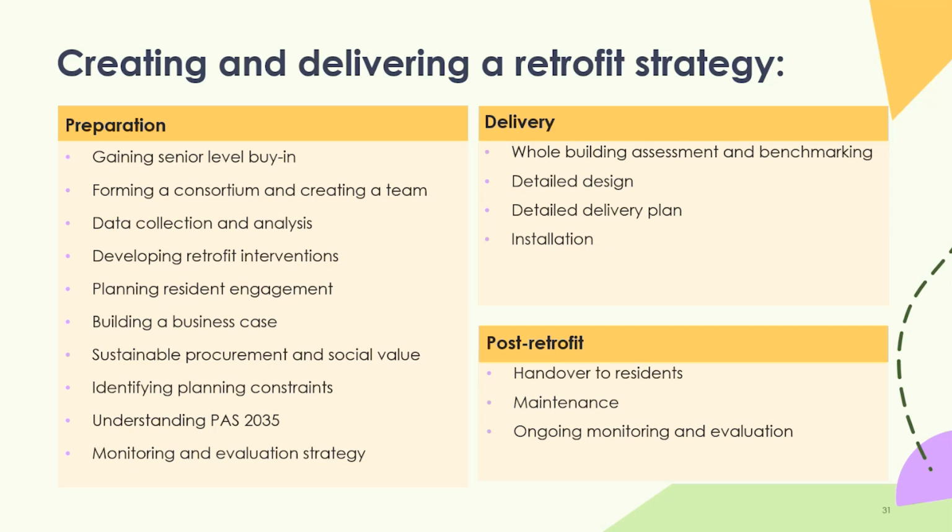And then finally, delivery, we're there. That's when we do the whole building assessment, do all our surveys, detailed design, detailed delivery plan, and install it, which feels quite simple to say, but of course is quite challenging in its own right. And then once that delivery is completed, it's absolutely vitally important that there is a proper handover to residents and that you've thought about maintenance for these things, as well as that ongoing M&E. So do people know how to use the new heat pumps? Do your maintenance teams know how to service them? Are they qualified to do that? There are all of these questions that need answering in the post-retrofit stage as well.